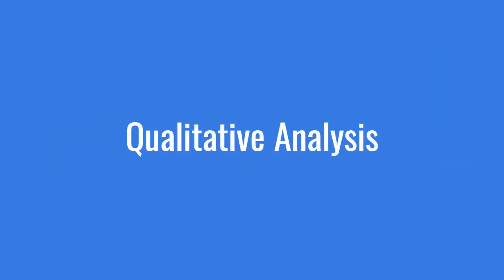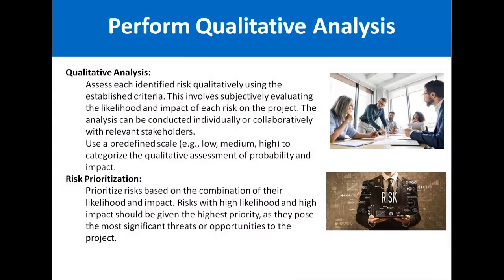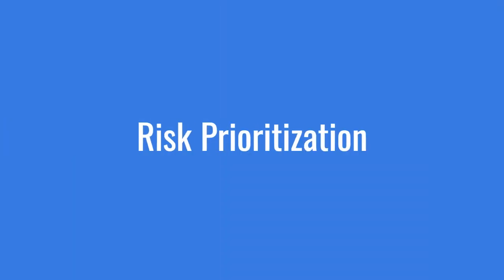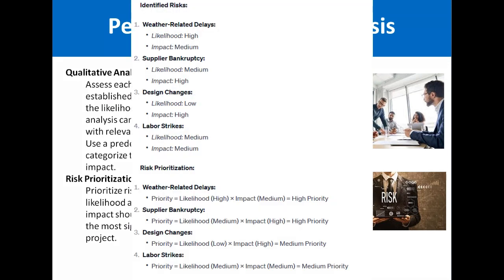Qualitative analysis means assessing each identified risk qualitatively using the established criteria. This involves subjectively evaluating the likelihood and impact of each risk on the project. The analysis can be conducted individually or collaboratively with relevant stakeholders. Predefined scales — for example, low, medium, high — are used to categorize the probability and impact of each risk. Based on this, risks are categorized and then prioritized as high priority, medium priority, or low priority, considering both threats, opportunities, likelihood, and impact.